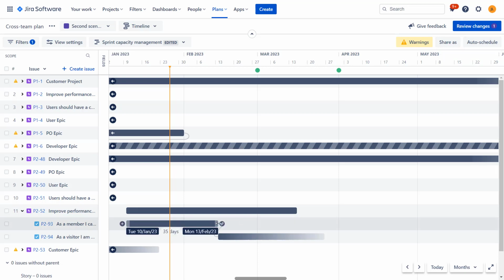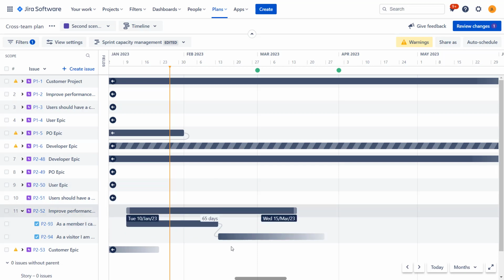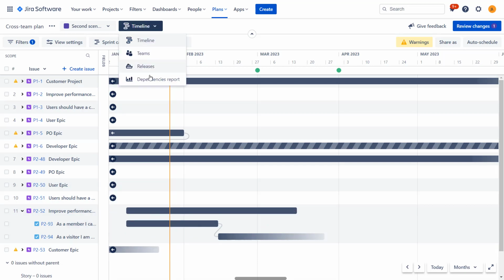So it is important that when we're doing the waterfall for planning, we basically need to switch between this timeline view and the dependency reports to monitor whether we're having problems somewhere, and manually adapt our plan according to whatever has to be done to fix these problems.